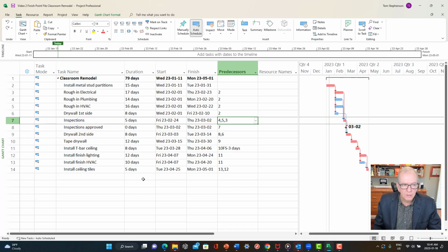and I said in this particular video we were going to discuss the work breakdown structure. All right, so let's add some activities, let's flush this out in more detail, and that's very often what happens. Ideally, I would have a work breakdown structure started. Like if I'm a company, I'd probably standardize my work breakdown structures if I'm doing similar projects. Like if I'm a custom home builder, I'd have a pretty standard work breakdown structure I would use. If I build a hospital, I'd have a pretty standard work breakdown structure that I do.